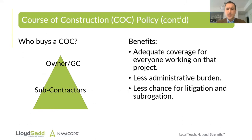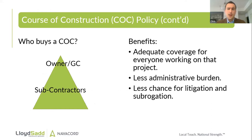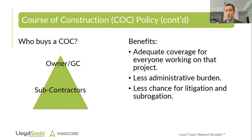So who buys a COC? Generally these are set up by the owner or, in most cases, the general contractor. The benefit of the COC is that there's adequate coverage for everyone working on that project. Without a COC, you'd basically be relying on everybody's installation floater — which pertains to an individual contractor's scope of work rather than the project as a whole. With a COC, it ensures there's adequate coverage for the entire project and all subcontractors involved, rather than relying on individual policies.